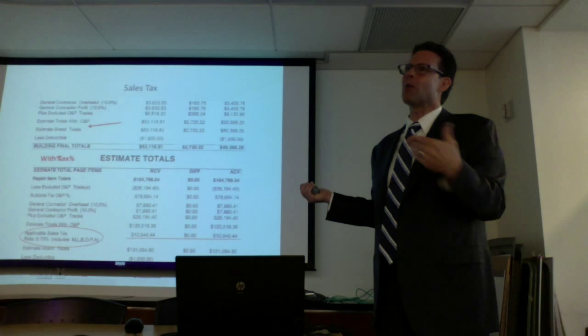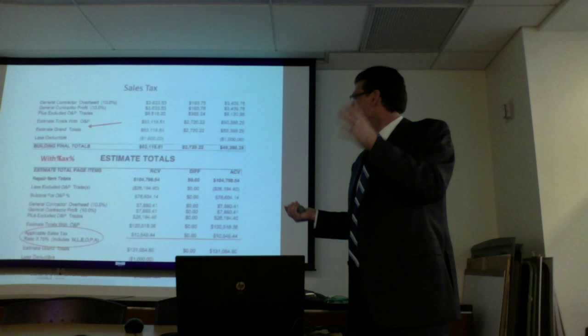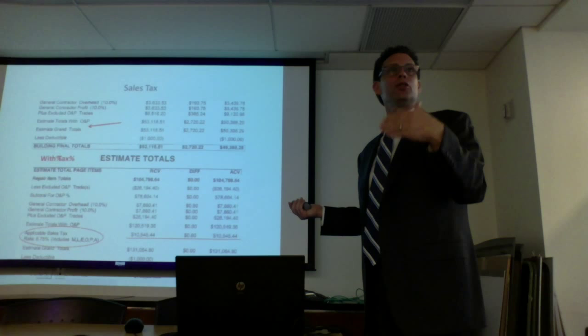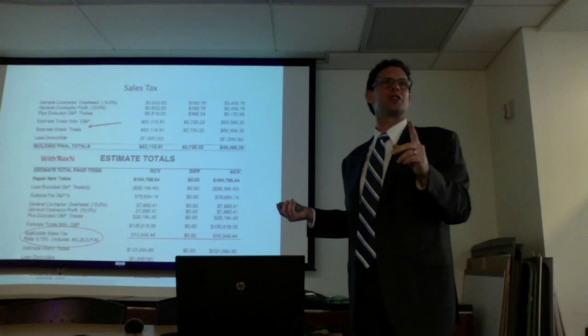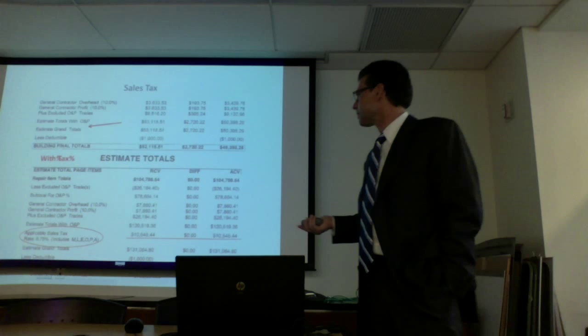But I can tell you right now, and I don't want to veer you from gas lines, but if you have an estimate that's, let's say, a $205,000 estimate, and it's a client who has applied or is able to get the ICC $30,000, and it's on SIMSOL, the one item you need them to change to max the 250 is the tax. And that simply gets you to the 250. You don't even have to look anywhere else in the estimate for issues or differences. Gas lines first, tax easier.